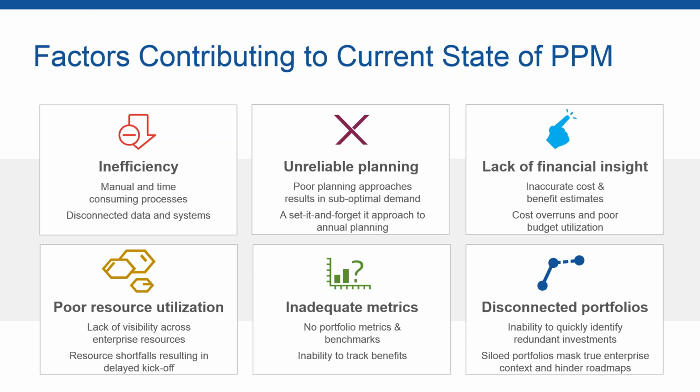One of the other key areas we see around that is the fact that many project managers hold money hostage. The forecasting capabilities in organizations are not where they should be, meaning that often, at the end of the year, it results in a budget utilization issue where there are funds remaining, which could have been reallocated throughout that year to better drive more value from the portfolio. So financial insights are key.